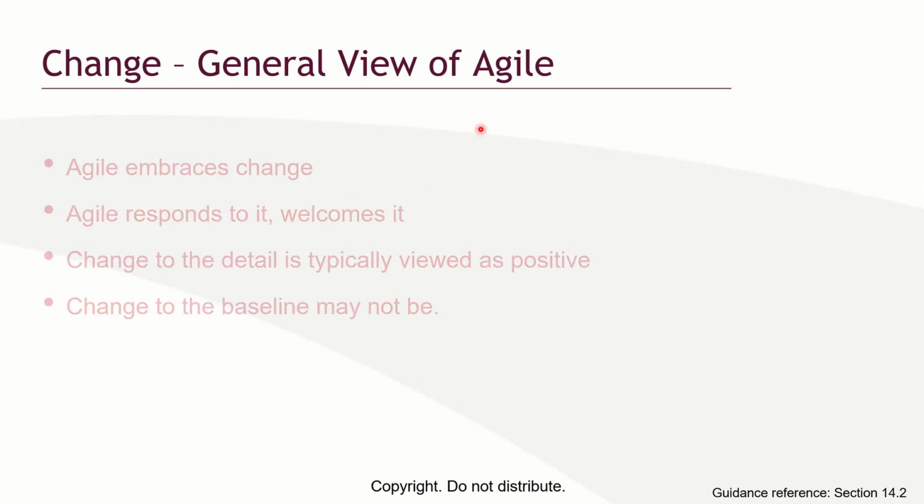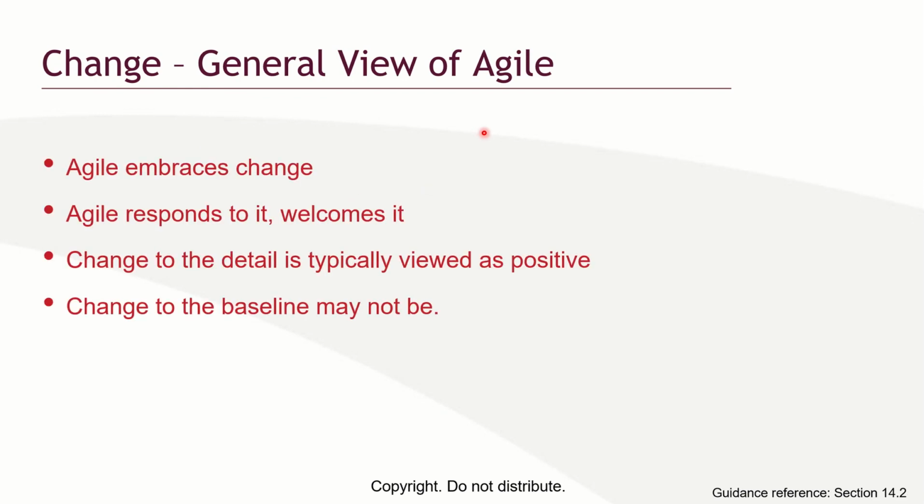Change. What is the general view of Agile when it comes to change? Agile embraces change. Agile responds to change and it welcomes change. Changes to detail is typically viewed as positive. Change to baseline may not be.